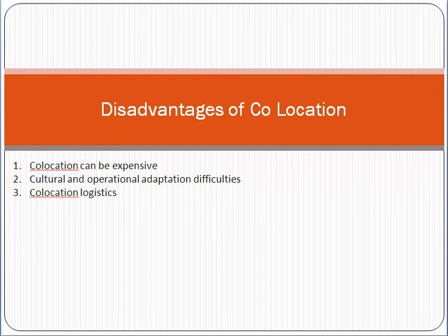Okay, now the disadvantages of co-location. See, when we talk about all the resources being at one location, it's more expensive. Always more expensive. Why? Because the resources need to sit together, they need a sitting arrangement, laptops, all the resources. So resource costs will definitely increase when all the resources sit at one place. Not only the human resource, the hardware cost, software cost, etc. will increase.